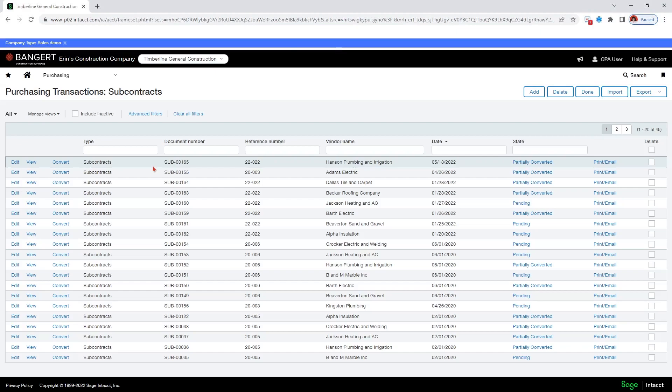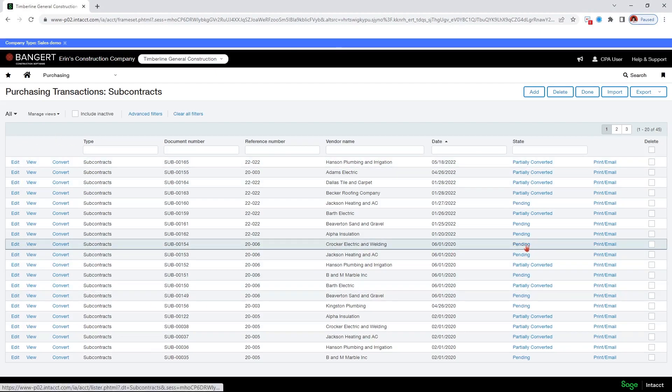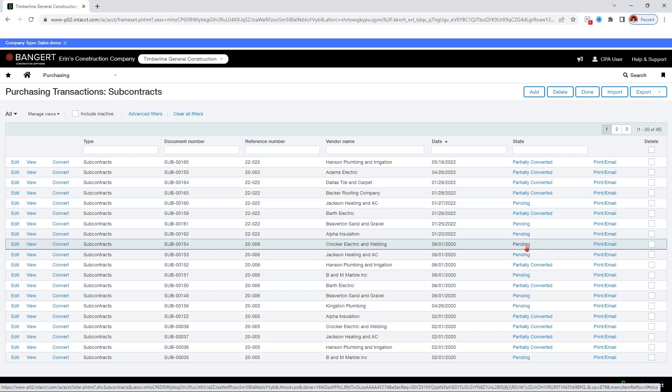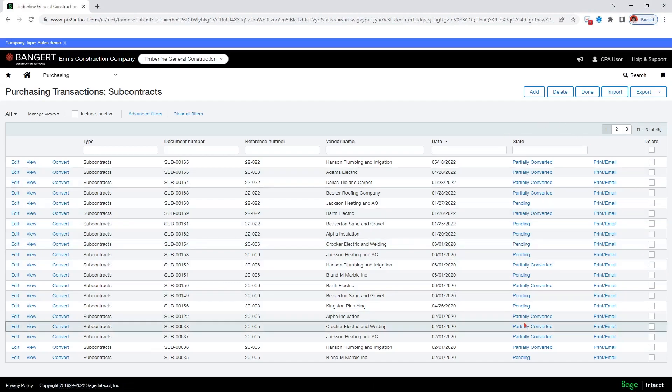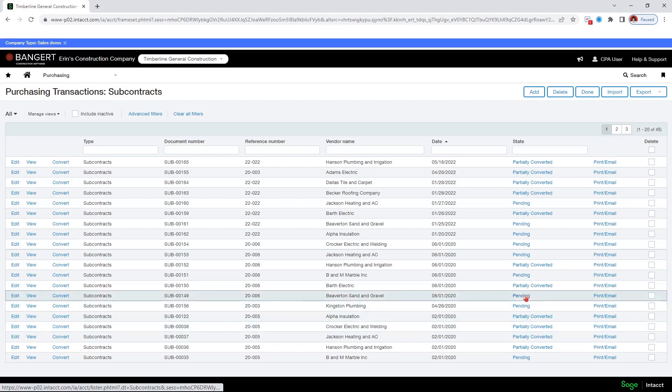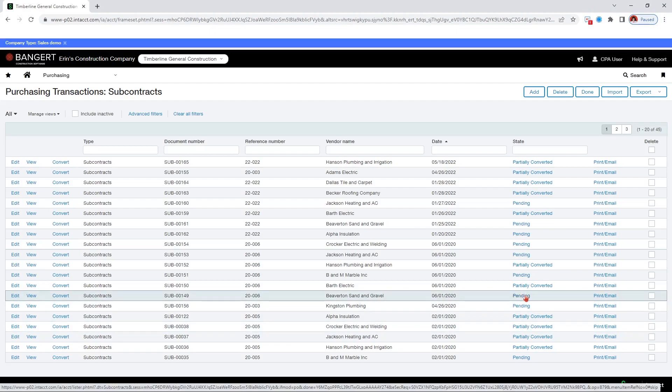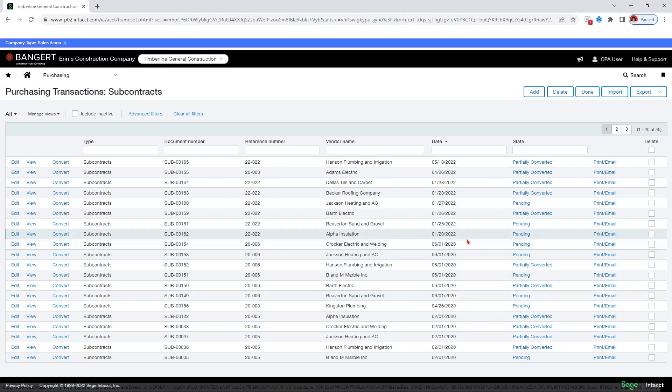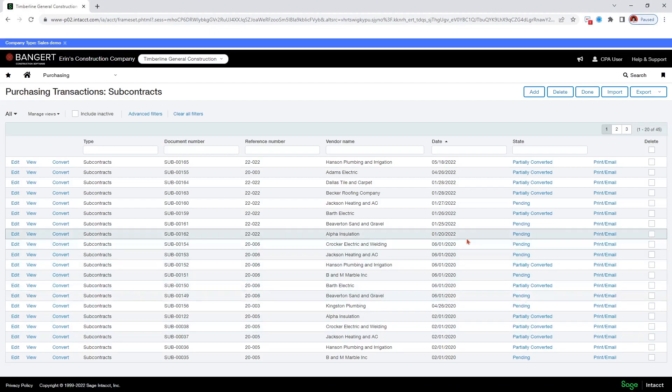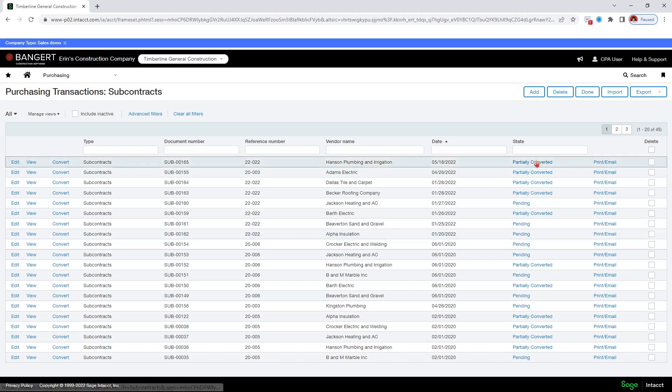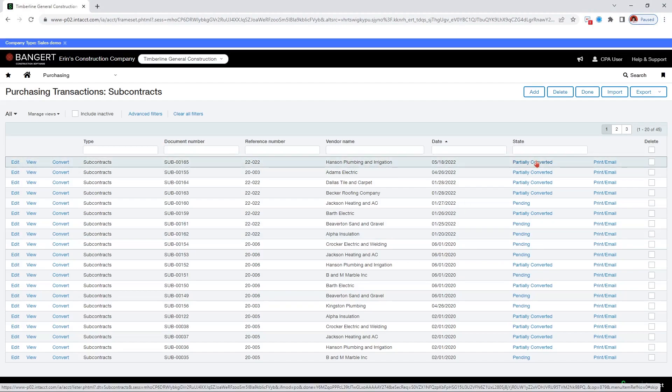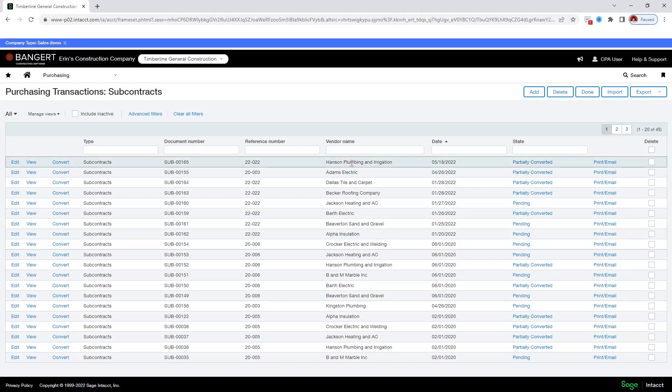It brings me a list of subcontracts. Now I can make changes when the status is partially converted or pending. Partially converted means it has been partially invoiced and pending means it has not been invoiced at all. So we're going to select, let's create a change order for pants and plumbing and irrigation.